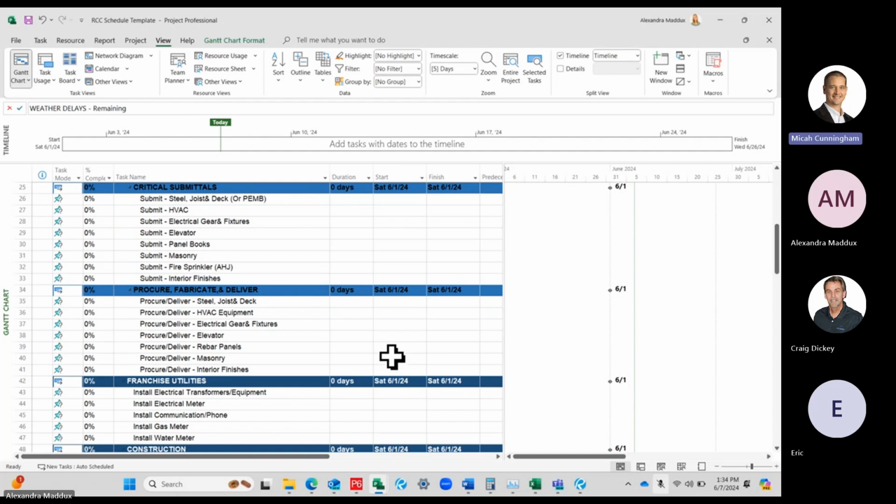Yeah, that's them trying to take the float. Normally the project owns the float. I don't know if you have contracts where it's different than that, but typically 9 times out of 10, the project owns the float, so they can't take it from you if you're early. They might try to take it, but that's where you would add yourself, like with the weather bank, final clean, final punch, contractor punch, just random stuff that you can change.